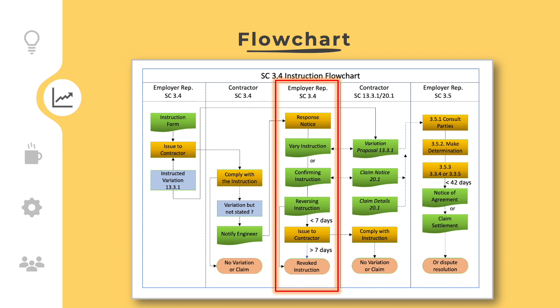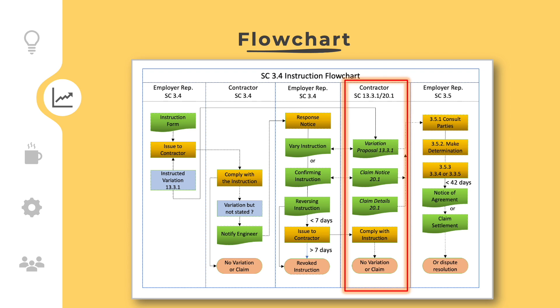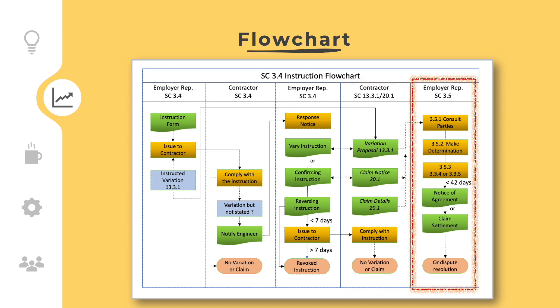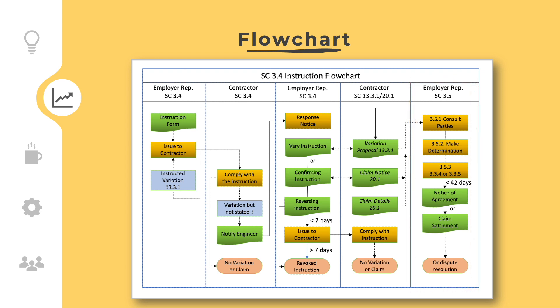Depending on the answer, the instruction can be confirmed, reversed, or changed. Unless the employer's representative reverses or revokes the instruction, the contractor must comply with the instruction. Depending on whether the instruction is a variation or not, the contractor must submit a variation proposal or decide to submit a claim notice. If the instruction results in a variation or a claim, then the respective variation and claim clauses shall be followed.